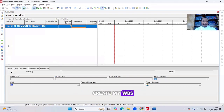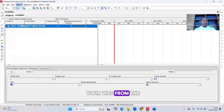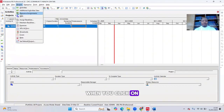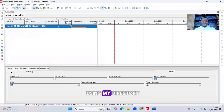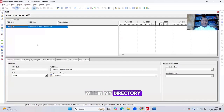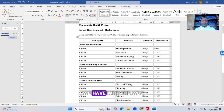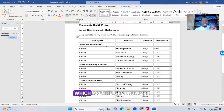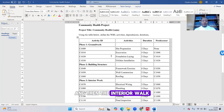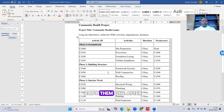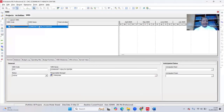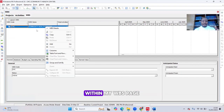Next is to create my WBS. I come to the WBS page within the directory — you can also see your WBS from the Project menu. There are three items in the WBS: Groundwork (phase one), Building Structure (phase two), and Interior Work (phase three). I right-click on the Project Title within my WBS page and click Add to create them one after the other.